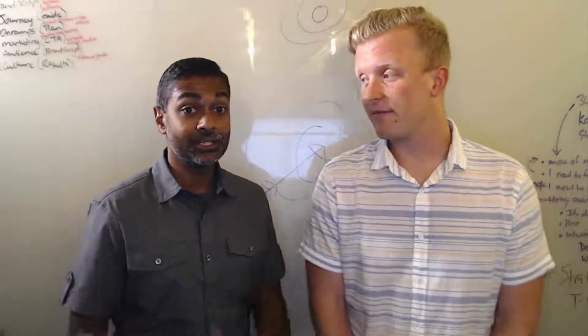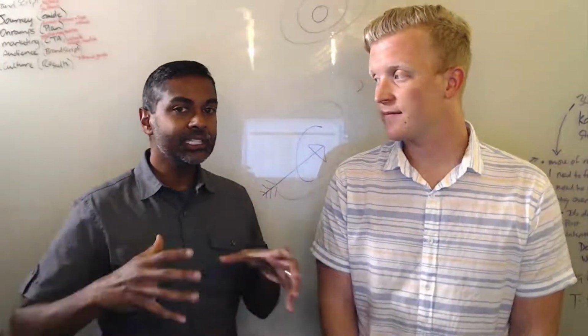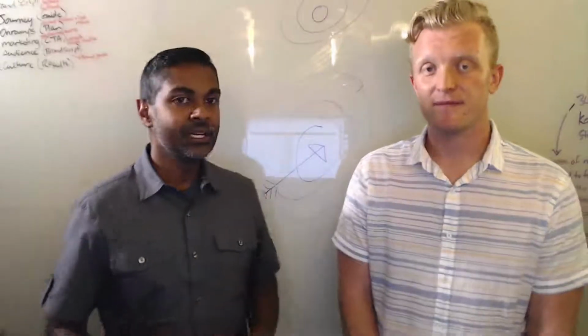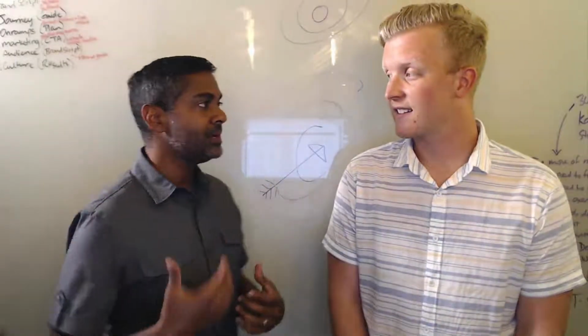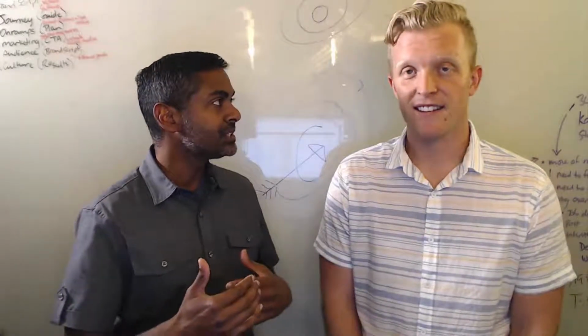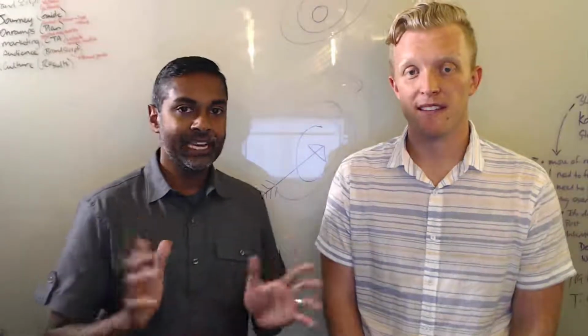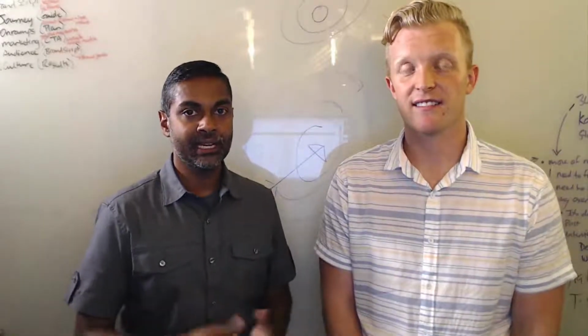Yeah, very good. So let's ask that question well ahead of time. So we're talking about 8 to 10 weeks out. We are literally scheduling a meeting on the calendar so that the communications people can meet with the pastor or the department head. And we're just talking through these questions so that we have plenty of time to come up with a great strategy so that we can execute a great promotion and a great event.